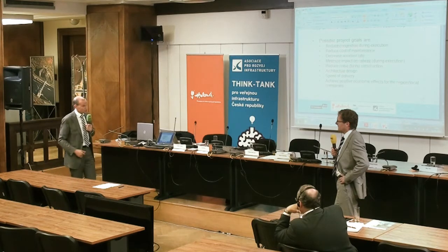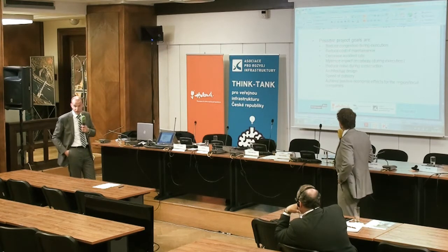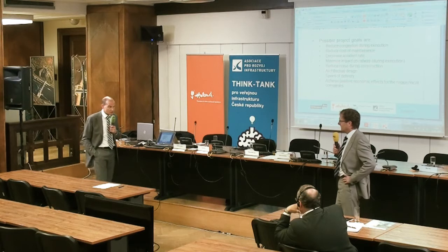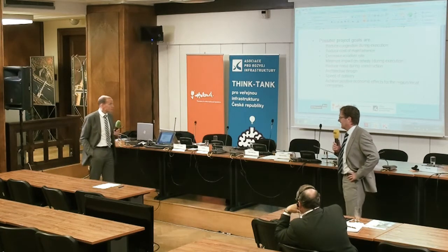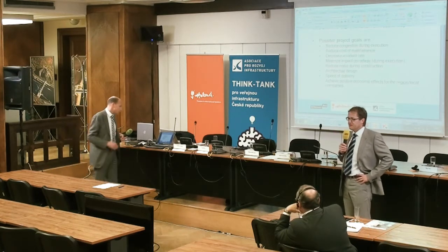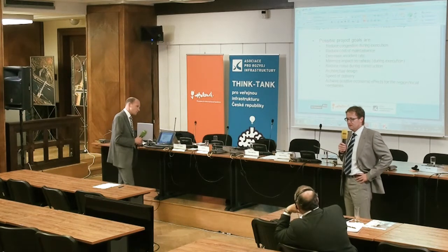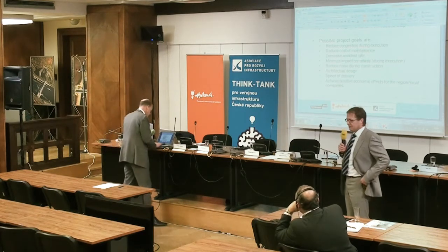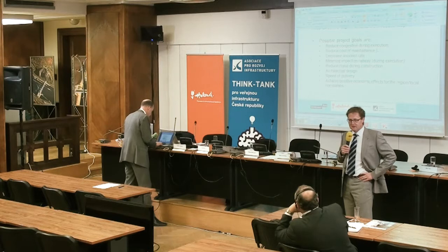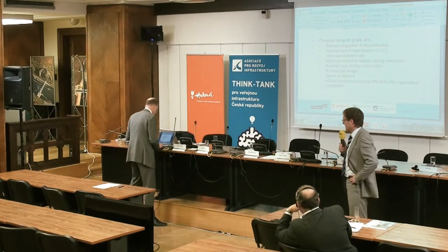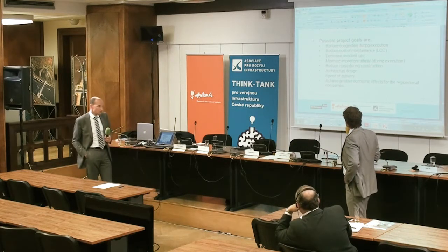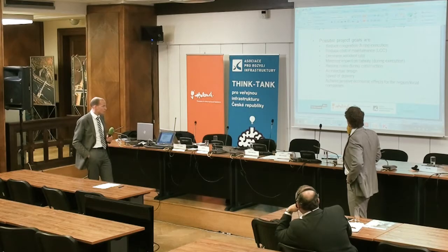But you could take this into account, even in a design-build contract, I think. Yes, sure. I think so too. Well, if you look at the directive, it says something about LCC, life cycle costing, that has directly to do with this. So you can, it's a very good possibility, use LCC or whatever kind of maintenance costs for your project goals.